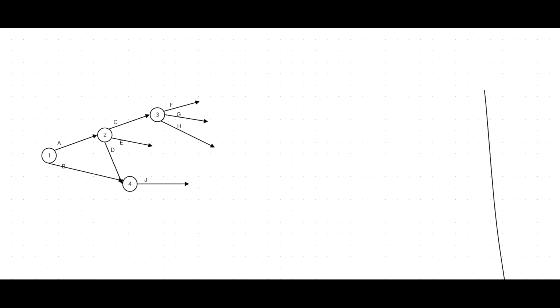Then the next one is K. After completing FJ. After completing FJ, please don't draw any lines. FJ. J here, F here. Again, we need to change the direction. I'll take the F this side. All should be the forward process.